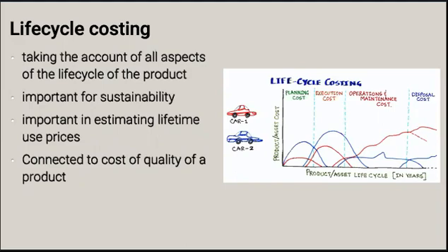And for some projects, the life cycle costing might be important, and they might be important for the customer as well. To understand the life cycle costing, in a given example, we see that car one, the one that has a red bar over here, has much lower costs during the project phase, so planning and execution, but the costs are steadily increasing throughout the operations and maintenance through the disposal.